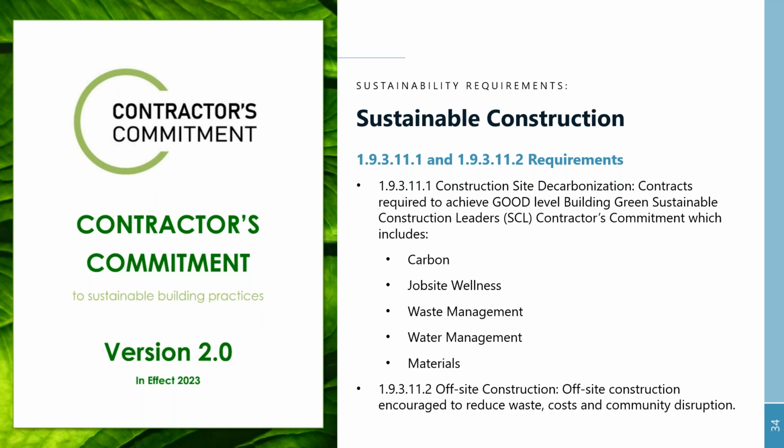GSA is requiring that contractors on GSA projects meet the good level of this commitment because it's addressing carbon reduction on-site, job site wellness, the waste management, how water is being used and managed on the site, and the materials that are not permanently installed but used in the construction process. I think the other important thing is there have been a lot of new developments in off-site construction, new standards being developed, and there's an encouragement to look to off-site construction because of its ability to reduce materials and the impact it has on the community.